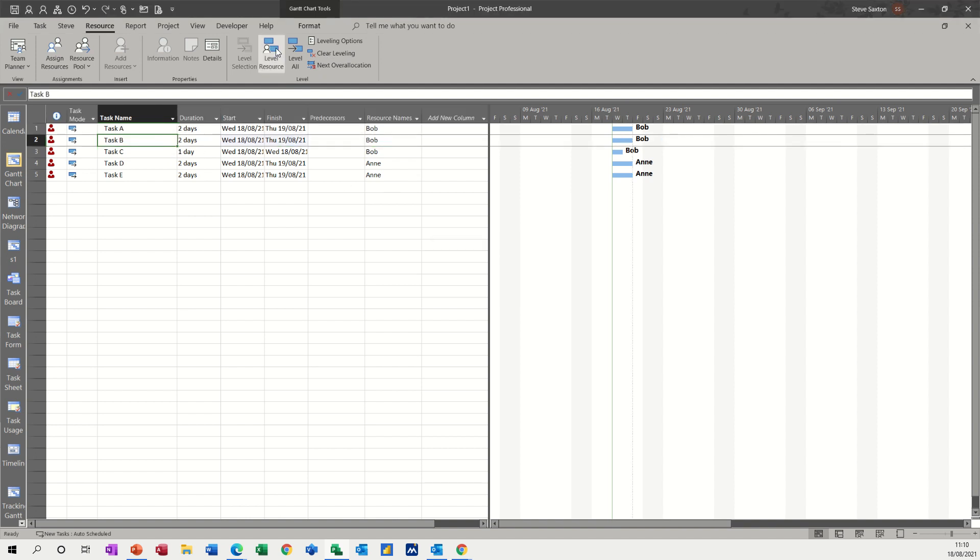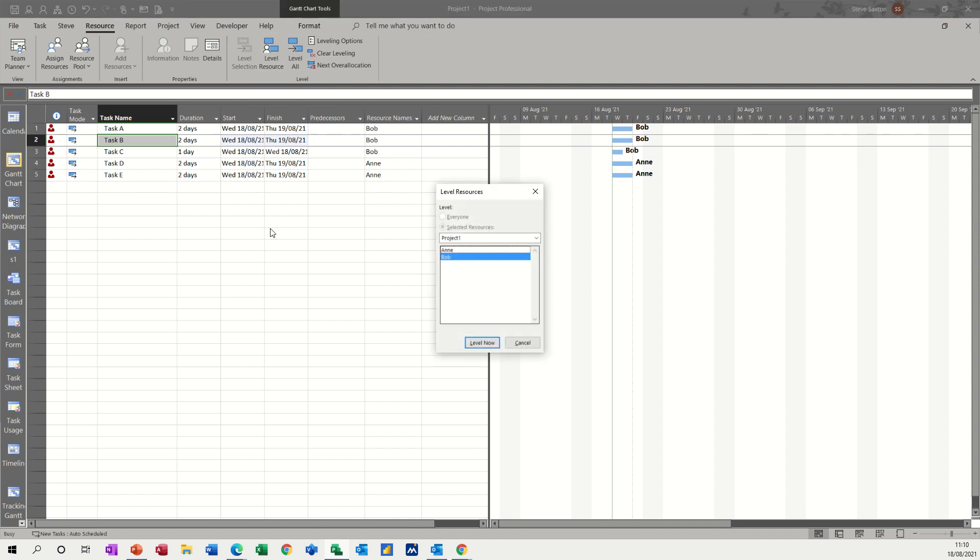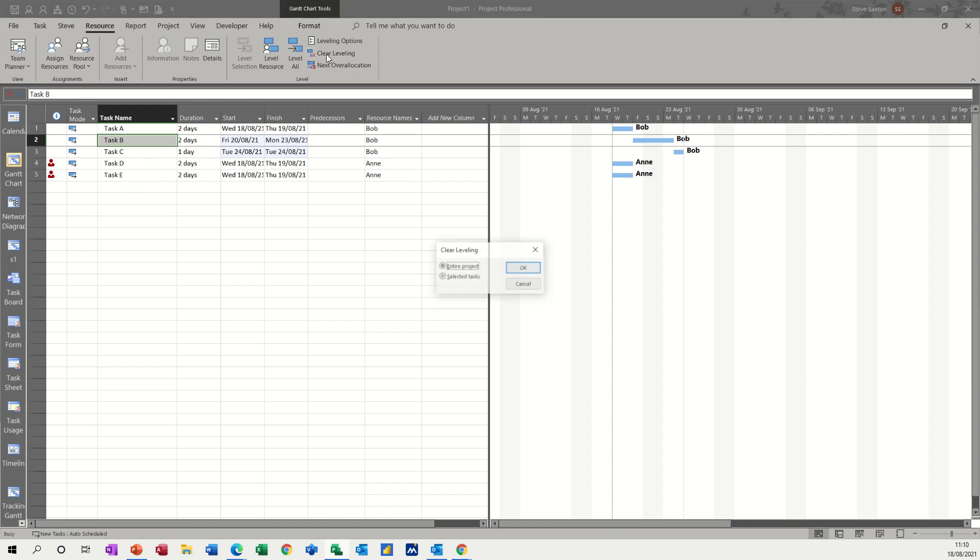Now, I can level the resource, so Bob is on three tasks and Ann is on two tasks. If I click level resource, I can select Bob and then level now. So now it's done a bit of a scattergun effect and it's shifted Bob on task B and C forward into next week, which is okay. Everything's good. Ann is still over allocated. So I'll clear leveling.